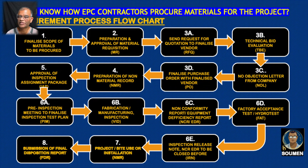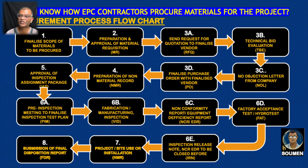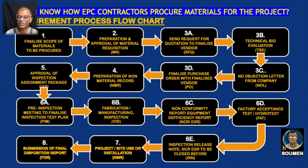After technical evaluation is finalized, a no-objection letter is obtained from the company confirming that the selected vendor can supply the material. Then the purchase order is finalized with that vendor. After the PO is prepared, we need to prepare the Non-Material Record (NMR) at the preliminary stage. It will be updated at the advanced stage of fabrication, manufacturing, or inspection. The Inspection Assignment Package (IAP) is where the quality department becomes very busy with inspection activities.